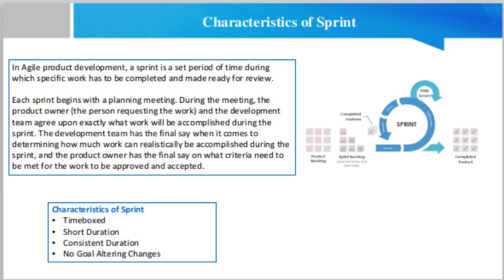Predictable outcomes. A time boxed sprint improves predictability. It's easier to predict what will happen in the next 1 to 4 weeks as compared to something which happens 6 months down the line. It's easier to say that we will complete login and registration functionality in sprint 1, cart functionality in sprint 2. Now compare this by saying that we will complete the e-commerce website in the next 6 months.